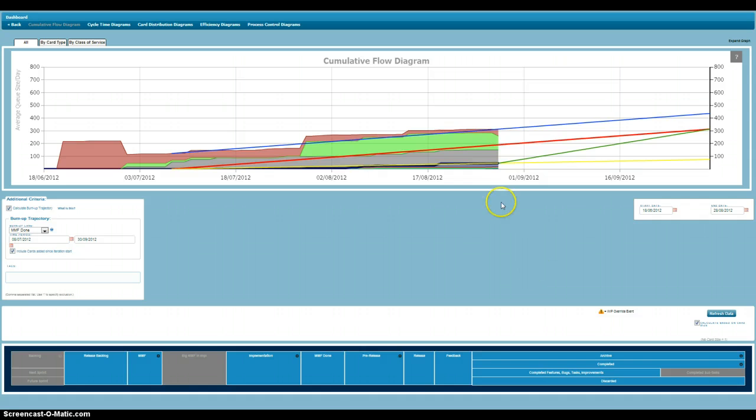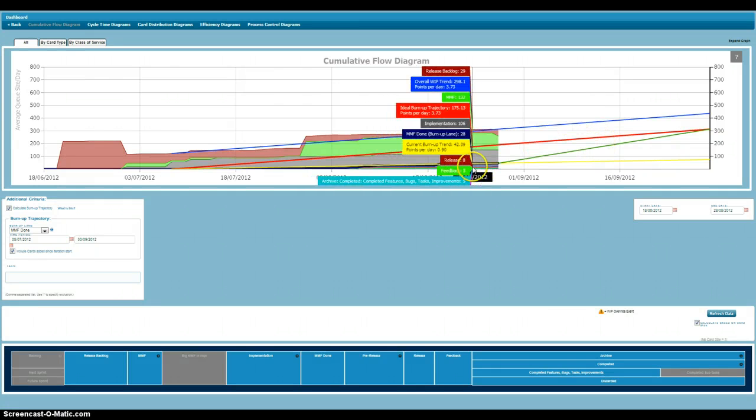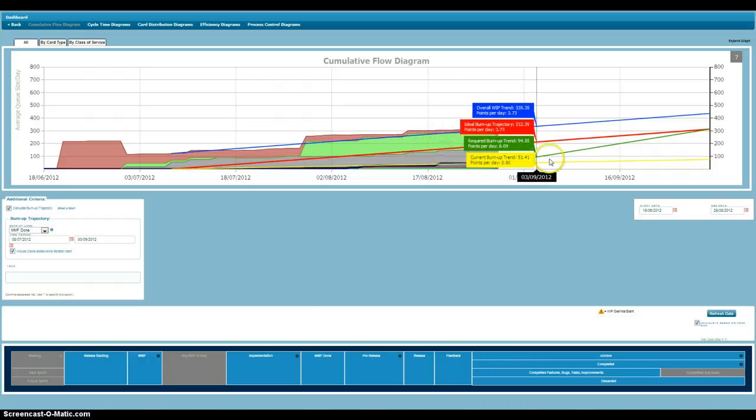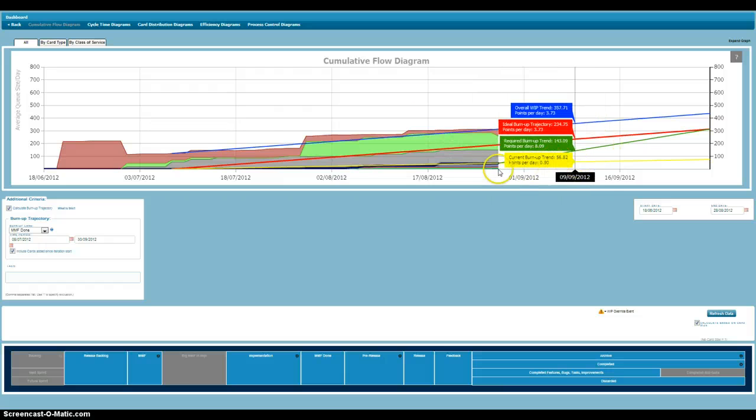But one thing the board wouldn't do is it will not fix the problem that you have here. Once you see this kind of gap, you need to really think what is going on. Do we have a very unrealistic scope for the version? Are we working in a mode where our WIP is too high and we think we will close everything soon, but at the moment we don't really know? So one way to deal with that is to reduce the WIP and see some completed items along the way.